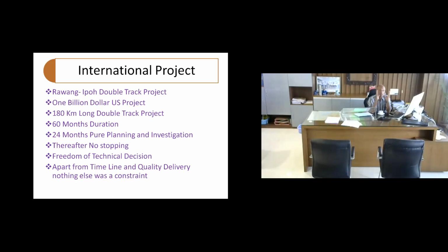And as I was saying, substantial project time has to be devoted to planning and investigation. So 24 months were for investigation. When I landed, it was already 18 months. Being from Indian Railways and from what I had seen here, project means execution at site. When I landed there, I had my chief resident engineer. There is a system on international projects that you have a chief resident engineer under whom different types of experts work. I was a track expert there.